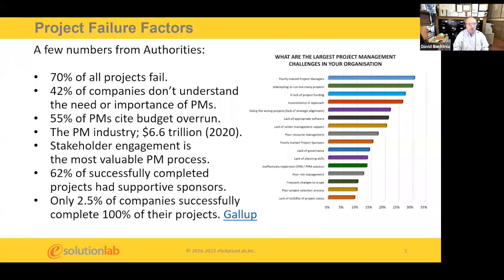Knowing how we can apply this emotional intelligence and processes in communication and connecting with our customers. Jean-Pierre, as a solo contractor, David has done way more than 200 contracts. Sure. What I do up front is, before I do anything, I communicate with my customers. I ask them many times till I'm clear about what they want. And quite frankly, during the pre-project communication, without my customer knowing, I'm gathering the requirements. So I have the scope of my project well defined before we do anything, even before we have a contract signed. And that is the success.